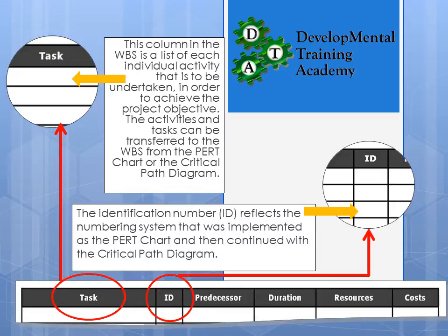First of all, Task. This column in the work breakdown structure is a list of every single individual activity to be undertaken on your project that is required to achieve the project objective. The activities and tasks can be transferred directly from the PERT chart or the critical path diagram. The second column is ID, or identification number, which reflects the numbering system implemented in the critical path diagram — stage one task one, stage one task two, and so on.